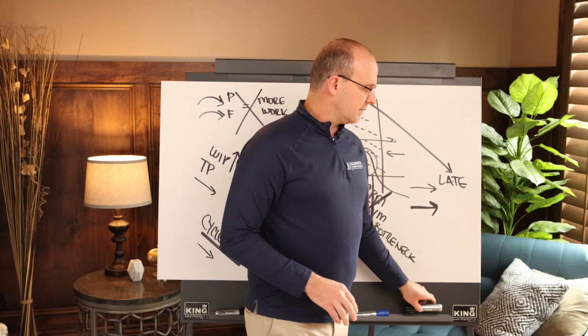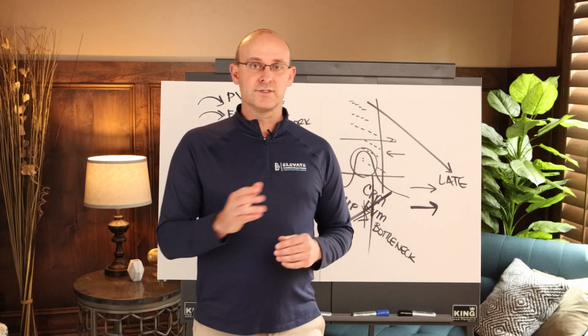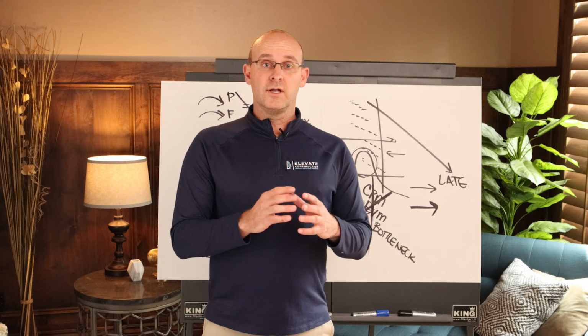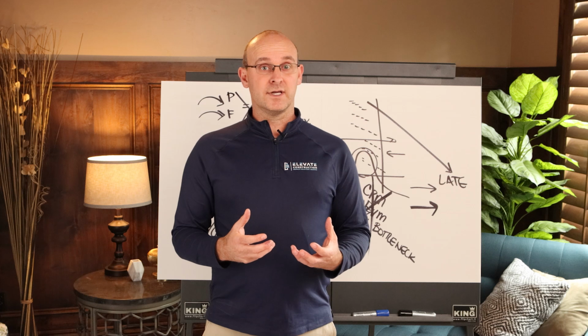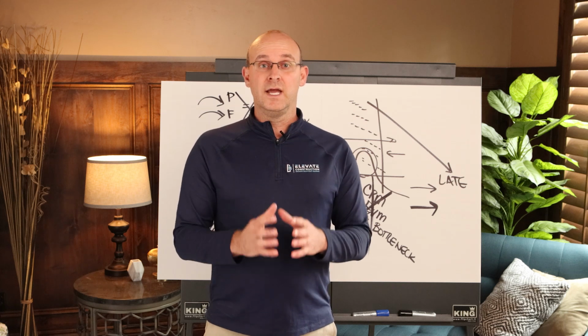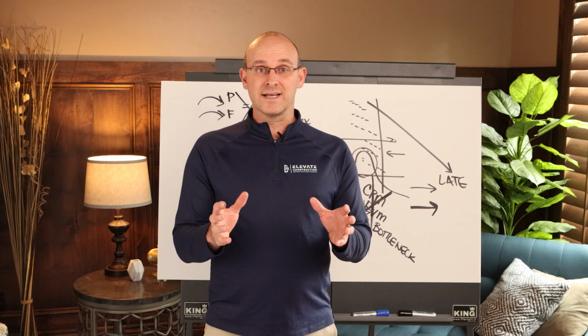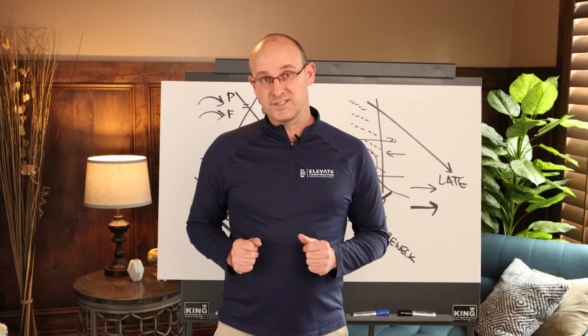So what you should be doing is having a good production schedule, leveling out your work, managing and controlling your work in process, and understanding your cycle times, understanding your throughput, and making sure you're not going past your capacity from a utilization standpoint.